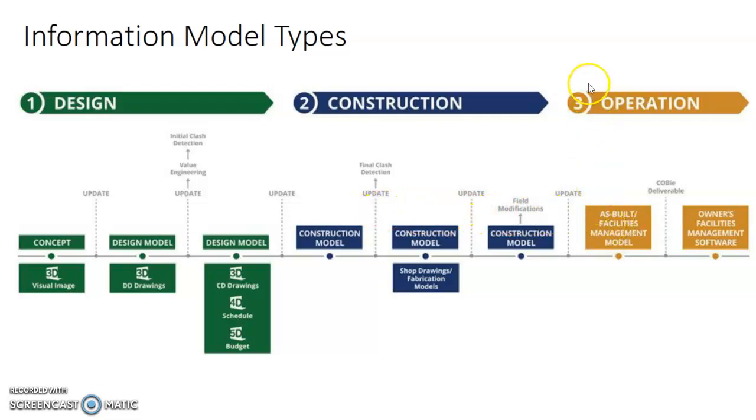Also along the way, you always need to have updates. So by the time it goes to the handing over to the end user, you can have the as-built or the facility management model. And then after that, you can have the owner's facility management software.